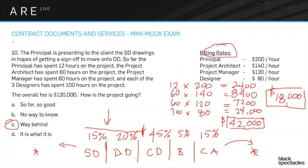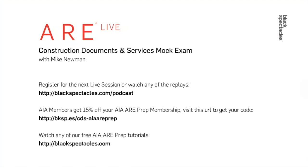There are other ways to structure billing — some clients want to see actual hours, the real rates of pay, and overhead amortized separately, with profit added at the end. That's a reasonable approach but not the typical one. On the exam, unless it's specifically spelled out, the assumption is that overhead and profit are already built into the billable hour rates.